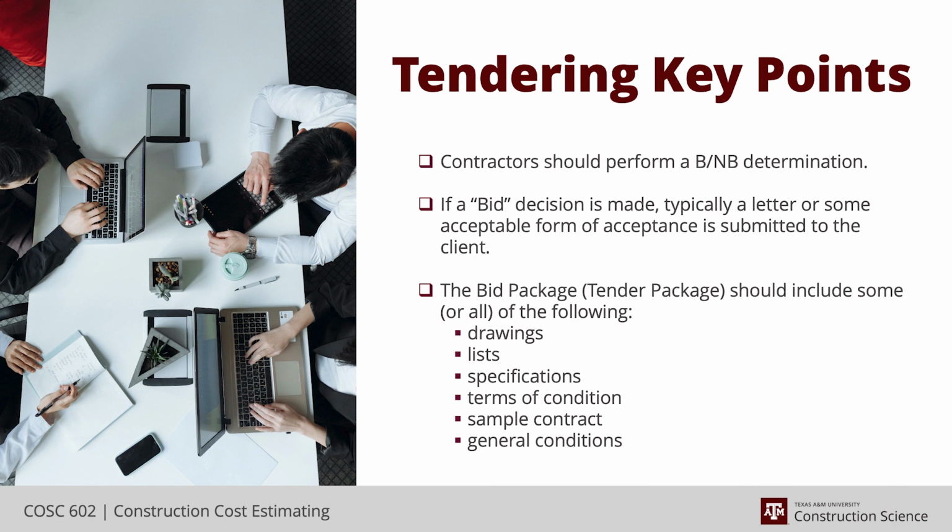I've always seen the client desiring some form of commitment as you go forward. In some cases, until you committed to bid it, they wouldn't even send you the full package. They would send you just a part of the package. So, for example, when we receive a full bid package, we're expecting to see a written scope of work, or in some cases they call it scope of facilities, and a set of drawings.